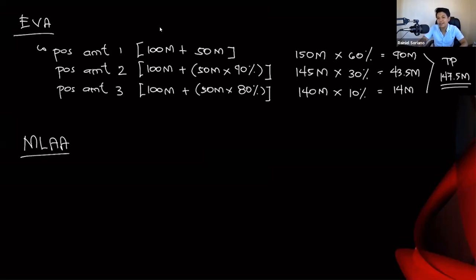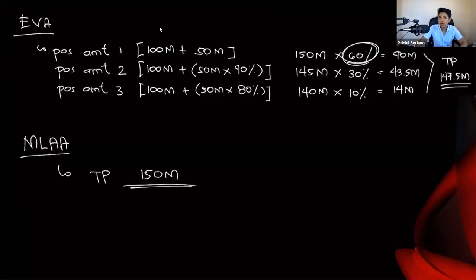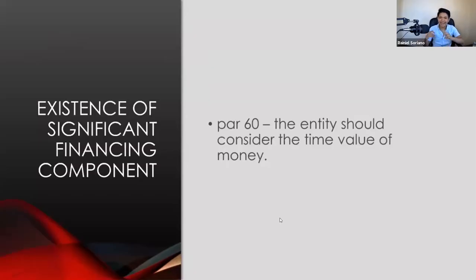For requirement B, the most likely amount approach: the transaction price equals the possible amount with the greatest chance of occurrence, which is the 60% probability scenario — possible amount one at 150 million pesos. Requirement B answer: 150 million pesos.